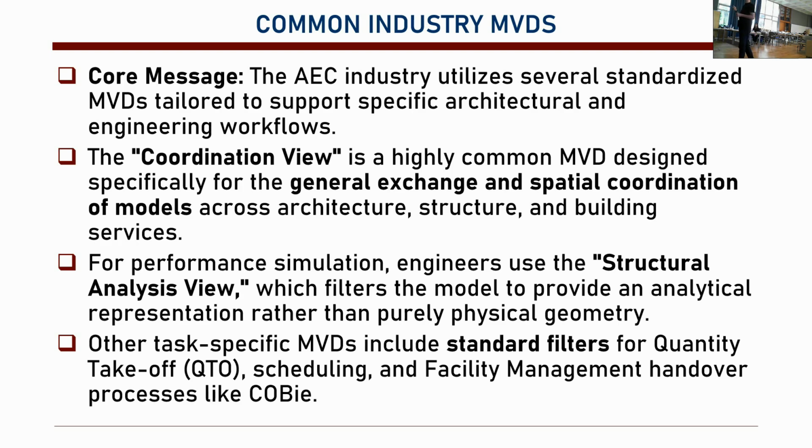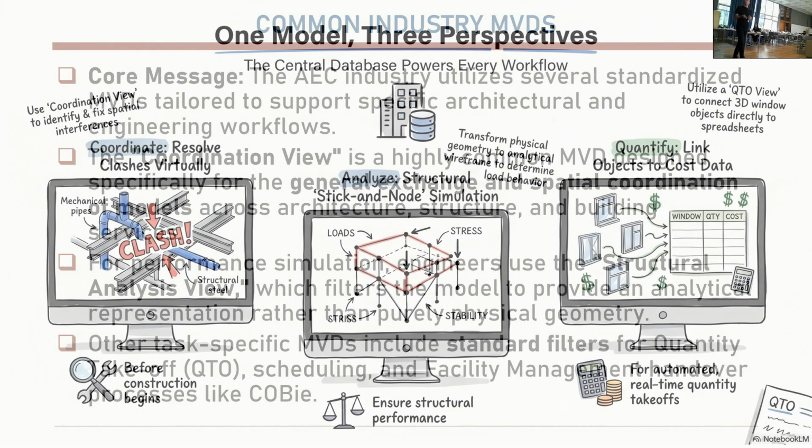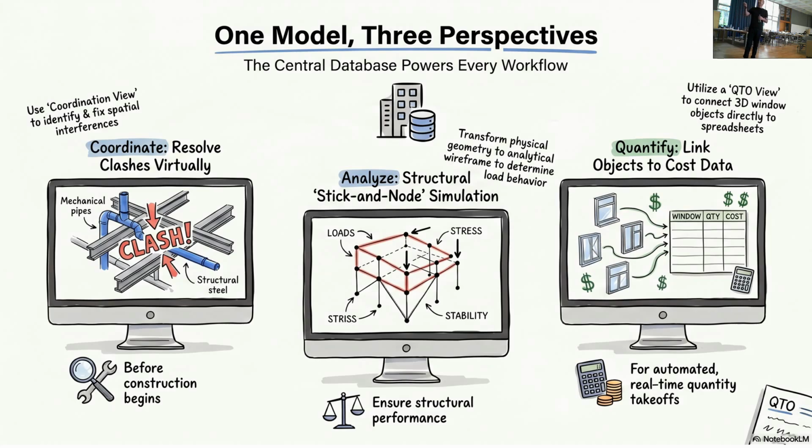So there are standard filters for many different things, like quantity takeoff, scheduling, FM handover, like COBie, etc. This is integrated into the software. Also, as I mentioned, your company may be too big, you may have too many processes ongoing, you may have your own software engineers who prepare MVDs for different software for you to use. So that's possible.